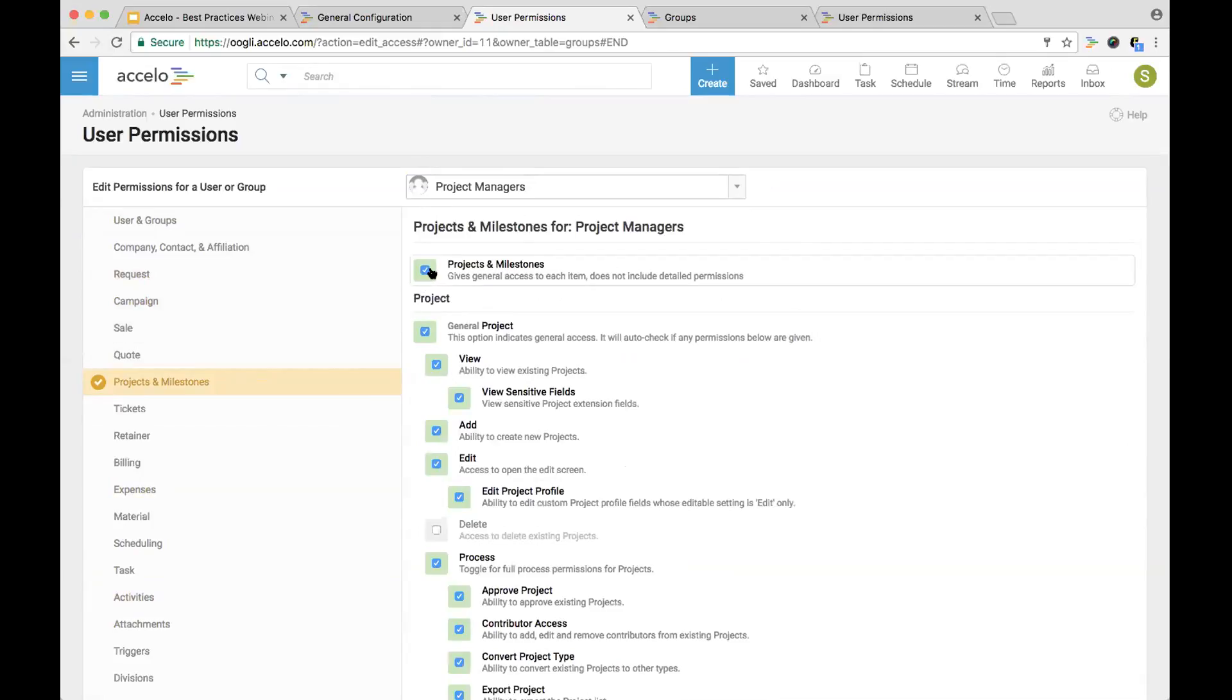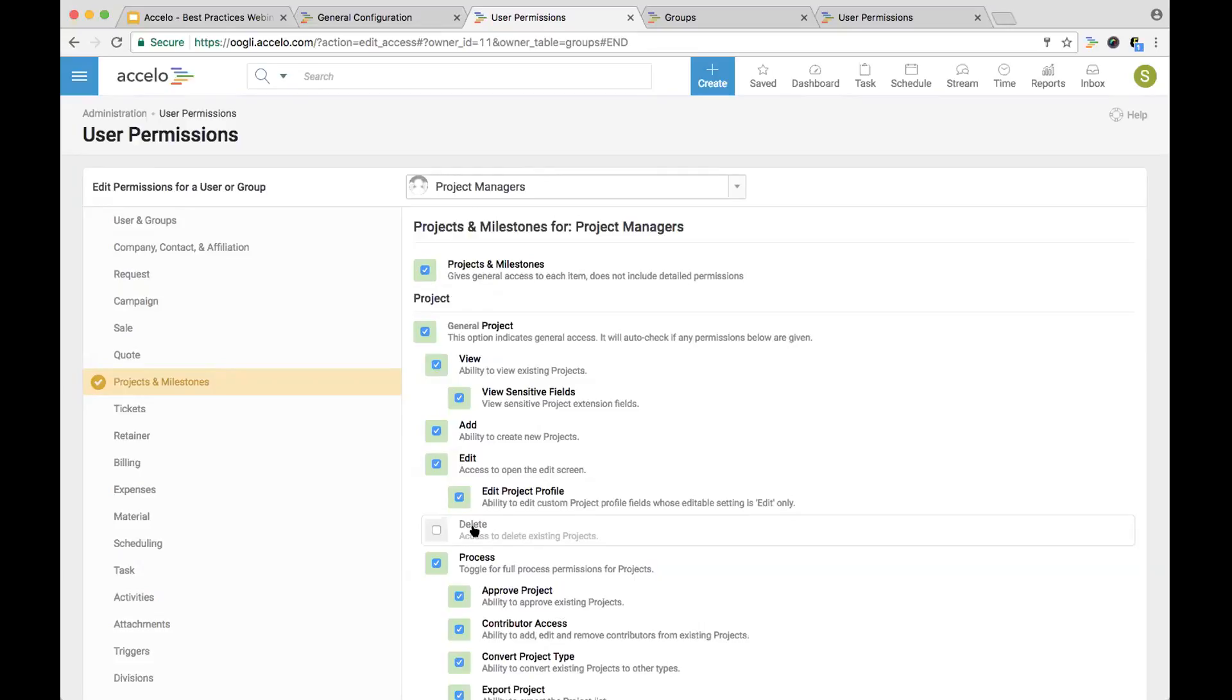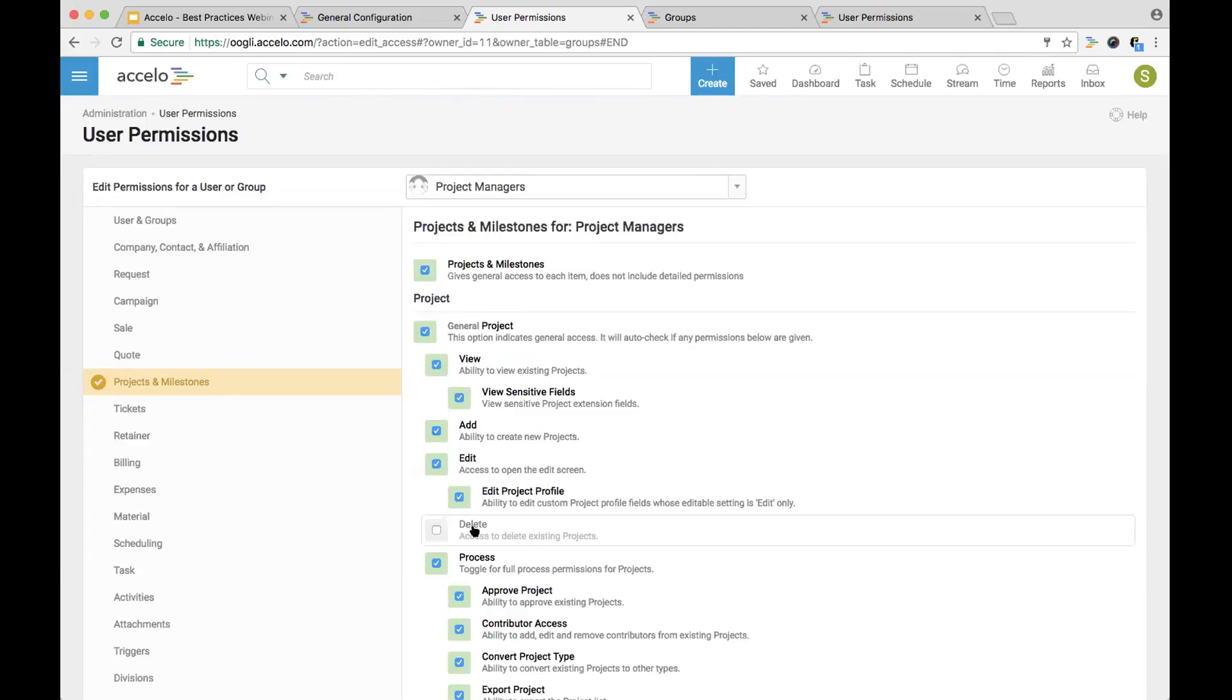But for project managers, they need to be able to view all project items. But what we limit them by doing is delete it. A good example for a lot of your full-time employees is to make sure they don't have delete access and if they want to delete things from the system, they need to contact an admin member to do so. The reason for that, there's a lot of repercussions from allowing them to do that. If you delete a project, it'll delete all the different milestones and tasks within them. Same thing with an activity or a client. For example, if you delete a client, it'll delete all the different sales, projects, tickets, retainers, invoices, contacts, all from the system. We highly recommend to limit the delete access to only your admin members.